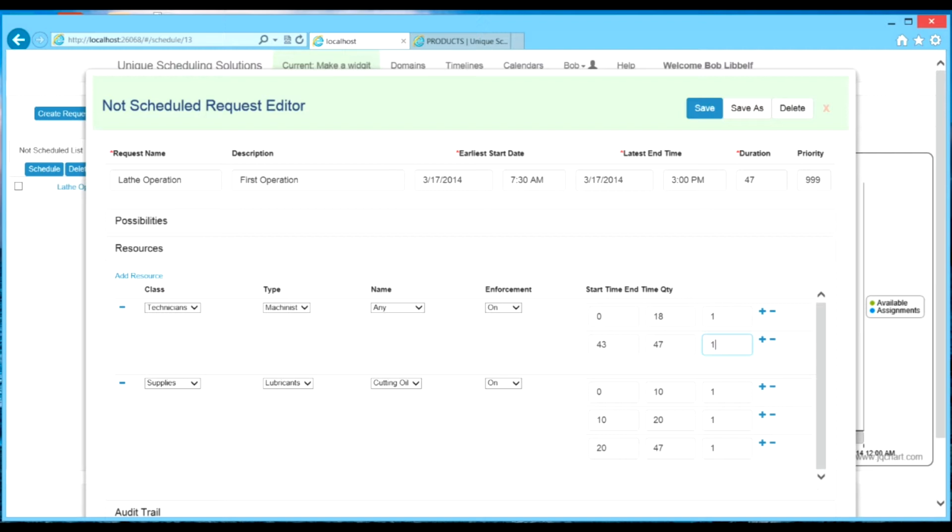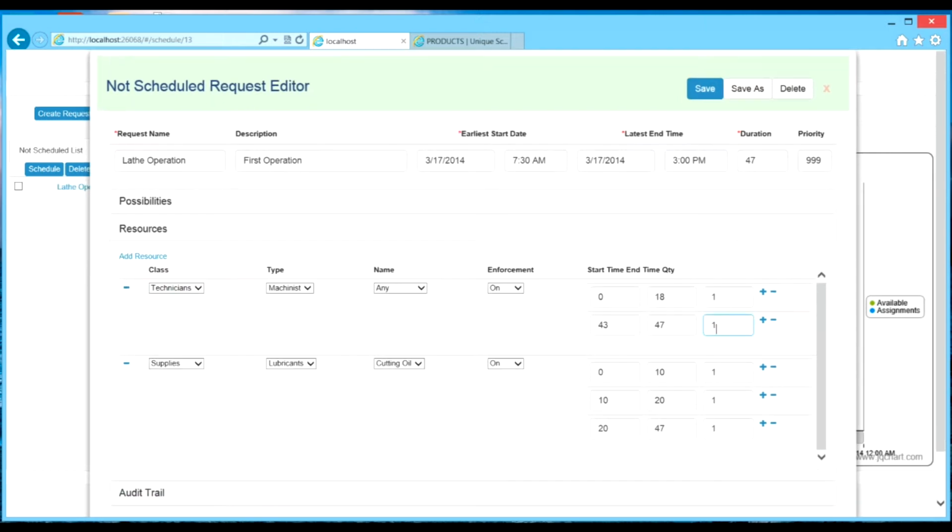We should note here that the times can be specified as any values, not limited to specific intervals such as 5-minute intervals, 15-minute intervals, etc., as required by a spreadsheet or many other scheduling approaches. In scheduling jargon, we say that the FAST scheduler does not use time buckets like many spreadsheet or similar scheduling techniques require. Instead, it treats time as a continuous variable with any values that you want to specify.